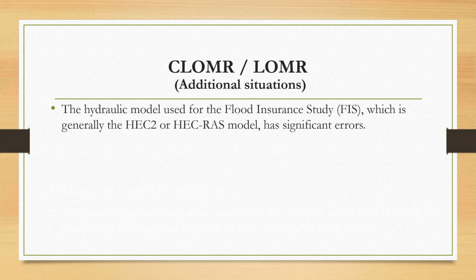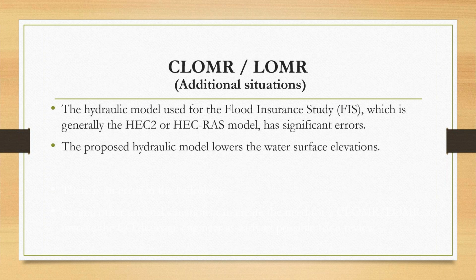All right, let's talk about additional situations that can trigger a CLOMAR. You have a hydraulic model, whether it's a HEC-RAS or HEC-2, and it's got significant errors. Well, that's not totally uncommon, and that can by itself trigger a CLOMAR. It could be to our advantage to fix that model, and that we would need to go and do a CLOMAR so that we can have a better project in this situation.